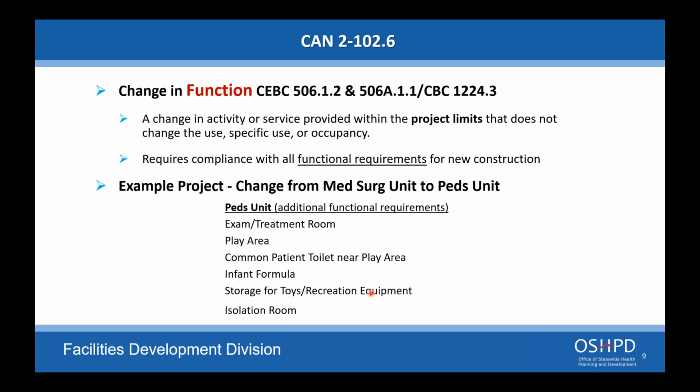Great, thank you. We have another question for you. The question reads, if a SNF generator has a repair that has to have it removed for the repair, and a temp generator was installed, when we come back to install it, do we need to provide updated code compliant items, for example, additional exhaust vertical pipe, change in anchorage, etc.? Your anchorage and the attachment and the installation of that new generator do need to comply with current code.